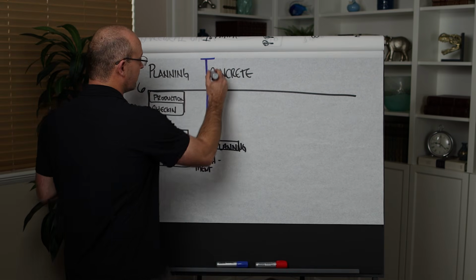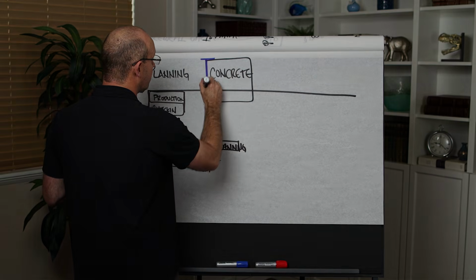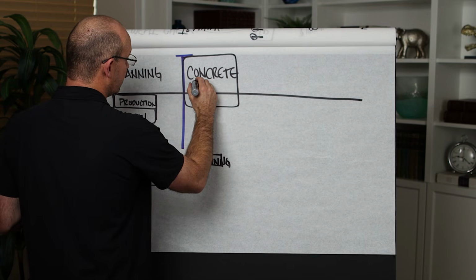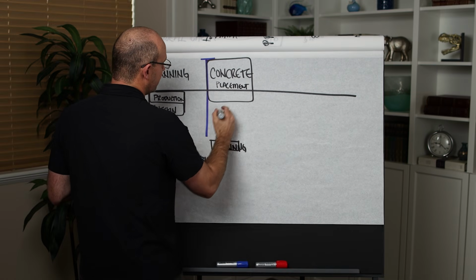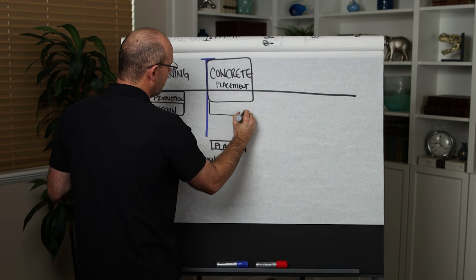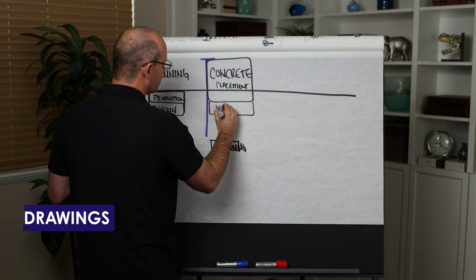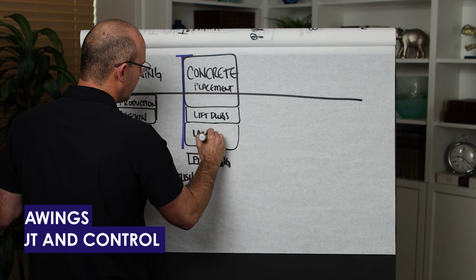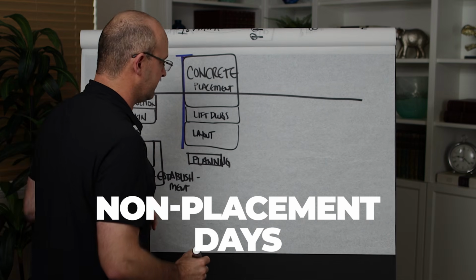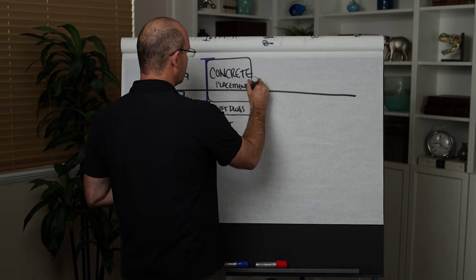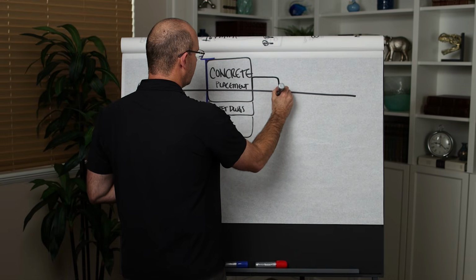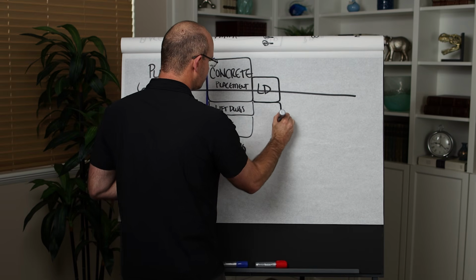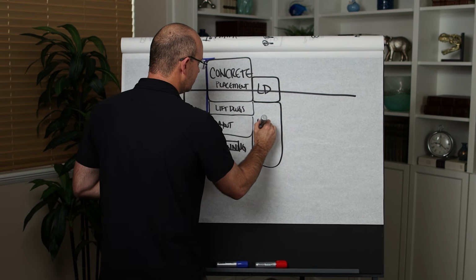If you're out doing concrete, chances are you're going to be doing the concrete placement support early morning if you're doing placement. So I'll write placement. If that is the case, then it would be later on in the day when you came in and worked on lift drawings and did layout and control. But I want to contrast that to non-placement days. You are probably going to want to get in here a little bit earlier, and work on, before you get bothered, lift drawings, and then go out and spend your time throughout the rest of the day doing layout.